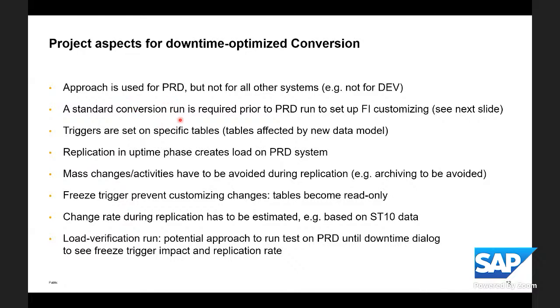Then, before you run the downtime optimized conversion on the productive system, you have to run a standard conversion run first to set up the fin customizing. This is explained on the next slide. We'll cover this in a minute.